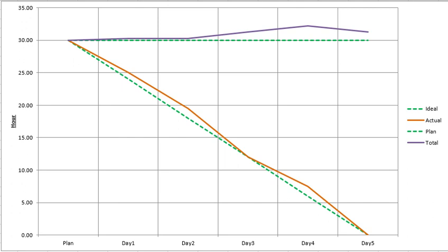The benchmarks are represented by the green dotted lines, providing a clear reference point. By observing the four plotted lines, the project manager gains a visual understanding of the situation. It is important to remember that the solid lines should not exceed the green dotted lines. If they do, it serves as a signal to investigate, analyze, identify the underlying cause, and implement appropriate corrective measures.